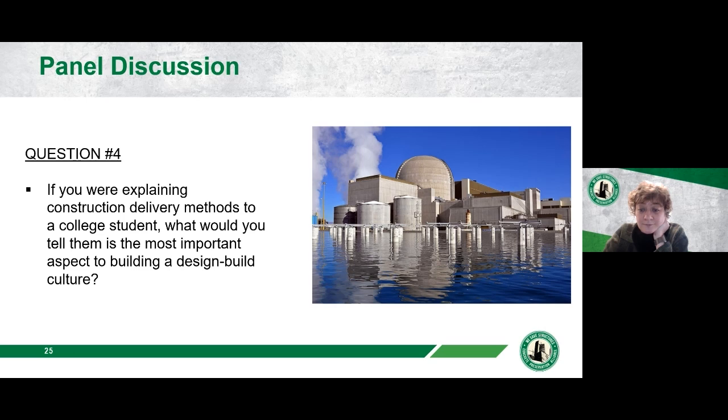Is that just chosen by who's the strongest, or is everybody the leader? Who's the leader of the design build team? So a couple fronts there. On any RFP and RFQ, depending on how the project solicitation takes place, on any submission, it's important that the design build team is outlining, both from an organizational structure standpoint as well as from a key personnel standpoint, who is taking the lead. And there needs to be an org chart as well as a communication plan, and how conflict is going to get resolved within that organization.